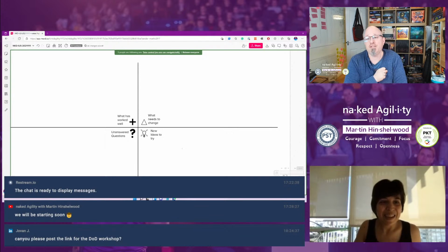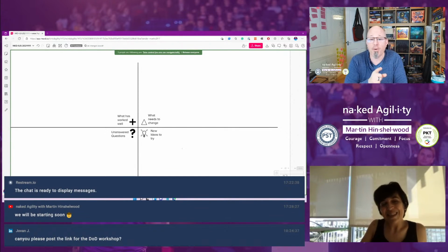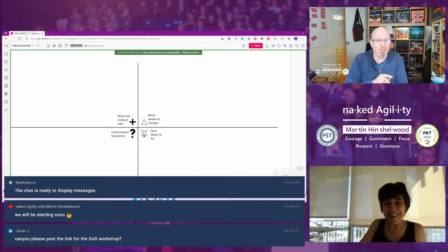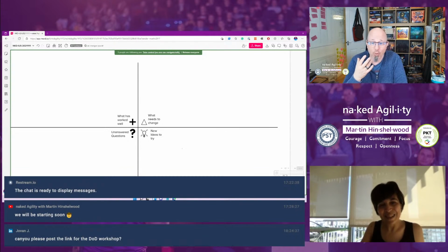Go watch the definition of done workshop, because we specifically talk about why having acceptance criteria on the definition of done is a bad idea. It sounds like it would be a good idea, but it's actually a bad idea because it locks us into scope. Again, we spent all this time in Scrum trying to be flexible on scope, but then we must meet acceptance criteria and suddenly we're locked into scope again.